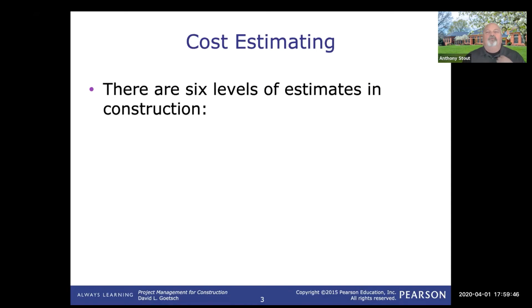And they're going to give you a figure, but really what they're giving is a figure that's built off of a square footage cost, an average cost to do an average home. It does not include all the detail. What type of material are you using? Are you using brick or siding? Are you using marble floors or linoleum or something like that? That significantly impacts the cost.